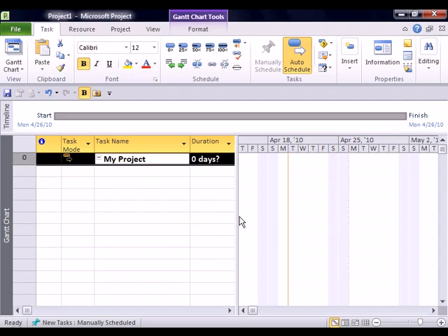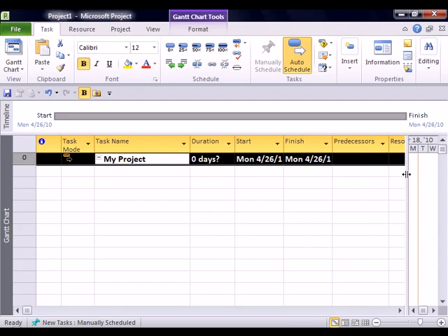And what you'll notice is in the Gantt chart view, I now have whatever I typed in that box. And overall, it's going to track totals: the start date, the total finish date, and total duration. I like this because it gives me a high-level snapshot. This is not the same as summary tasks. In fact, I can't get in here and edit this at all. It's simply tracking everything that's going on below in the project and giving me totals overall.